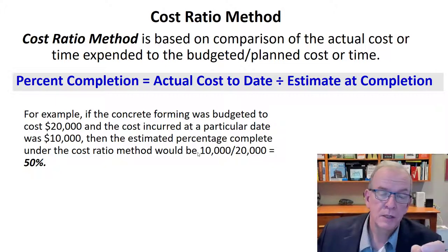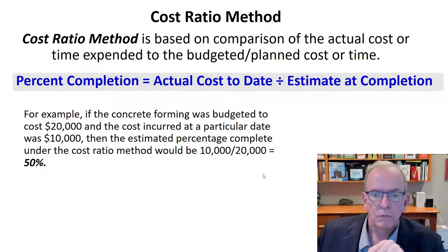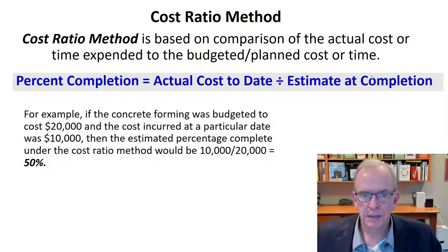So it's assuming that you've got 10,000 of it done, that the other amount, which would be your 66.666%, that would be left, would be now much more money, because it's $30,000. So as far as complete, it's 1/3. So it's a little bit different when you think about the estimate at completion.